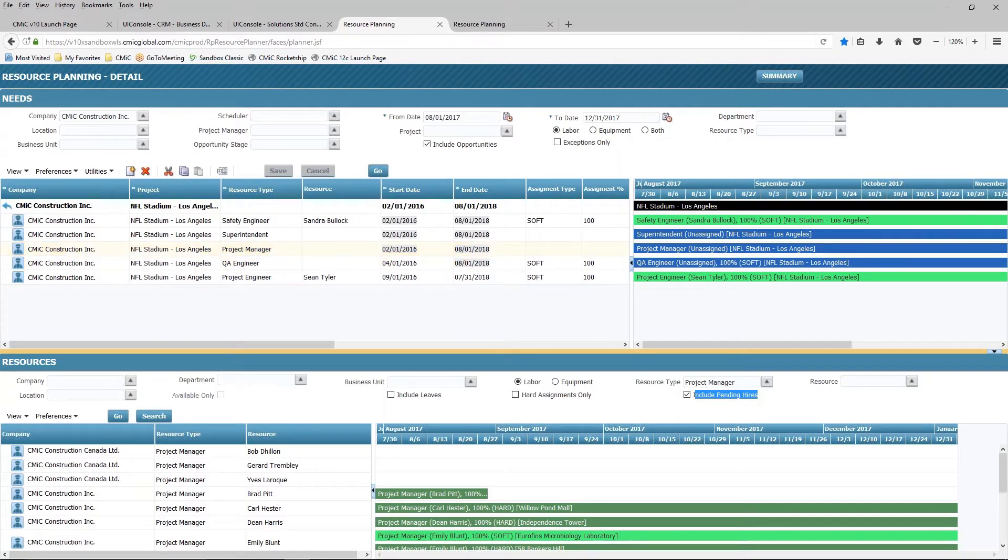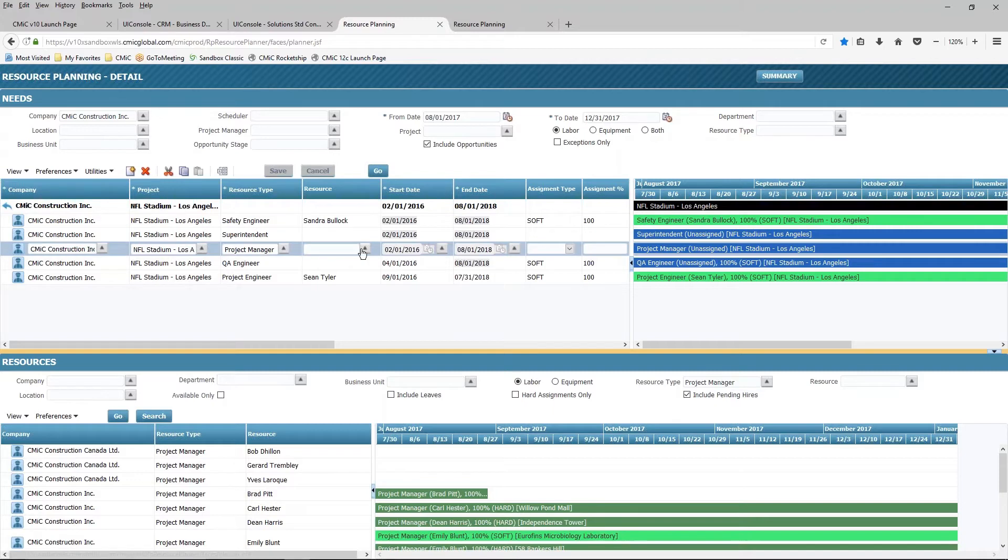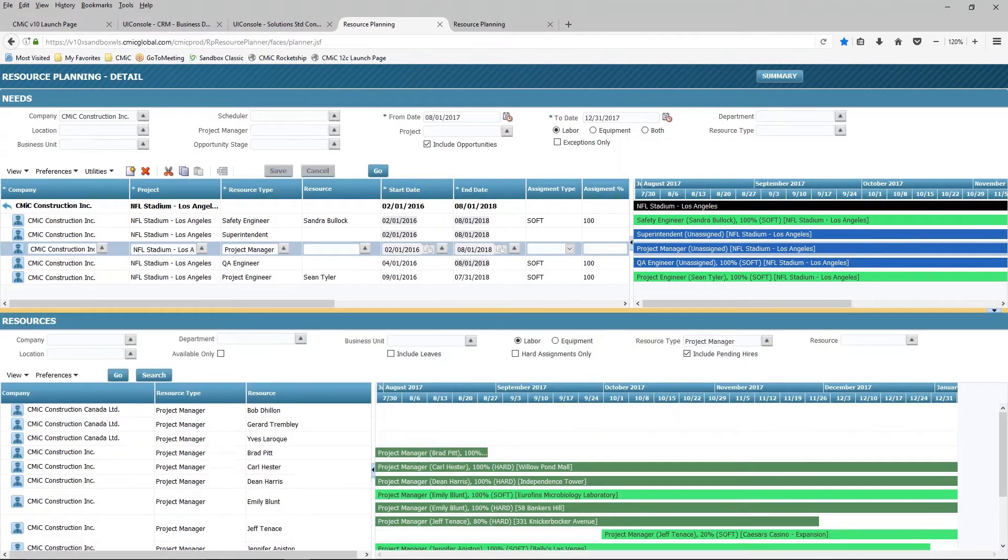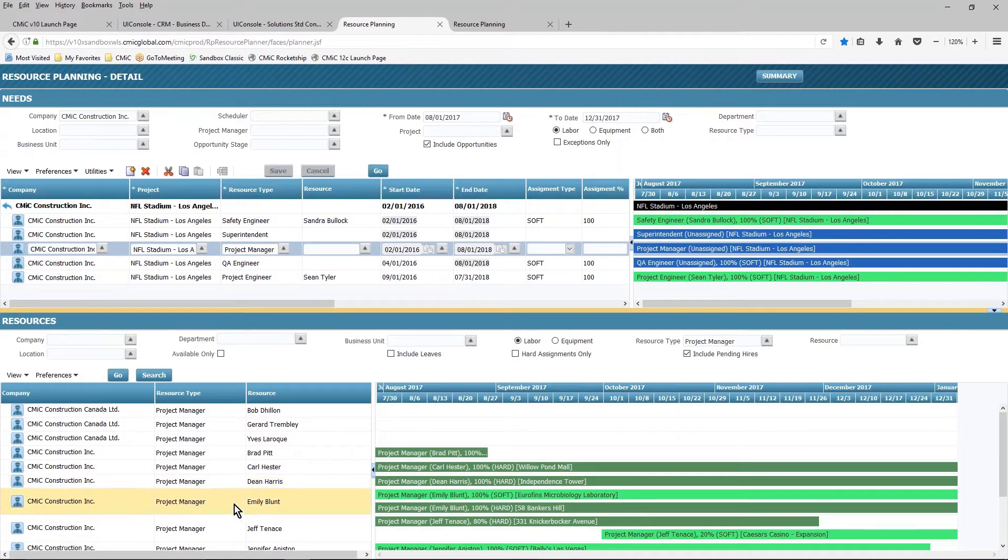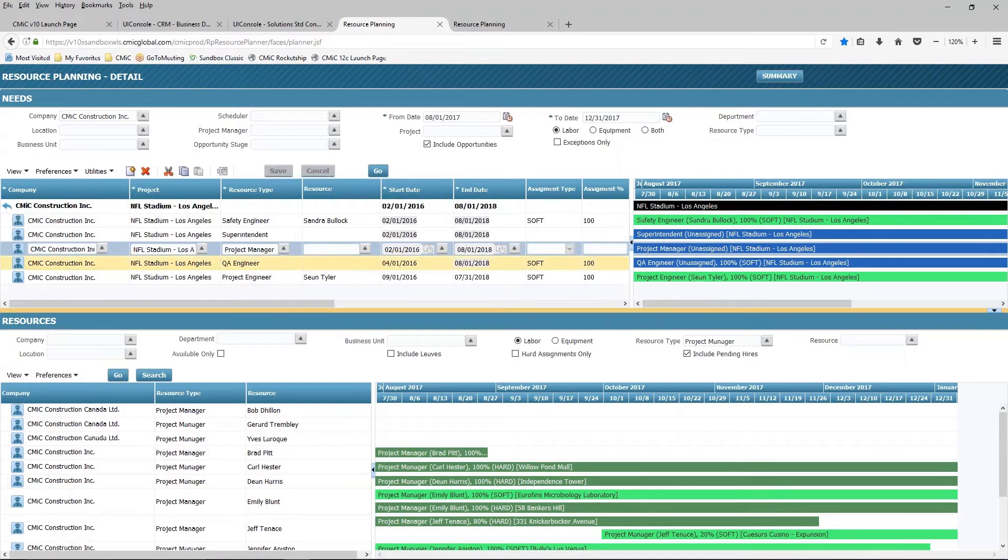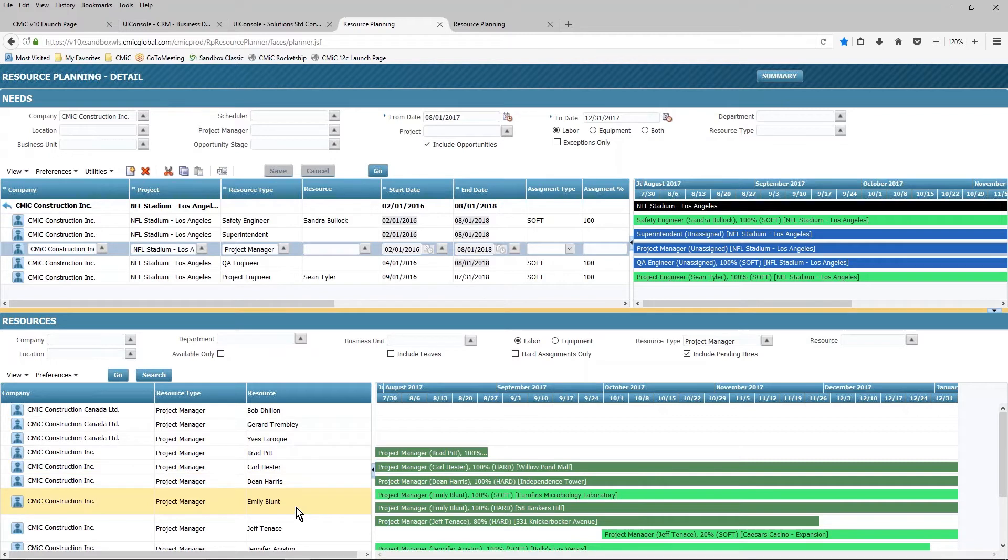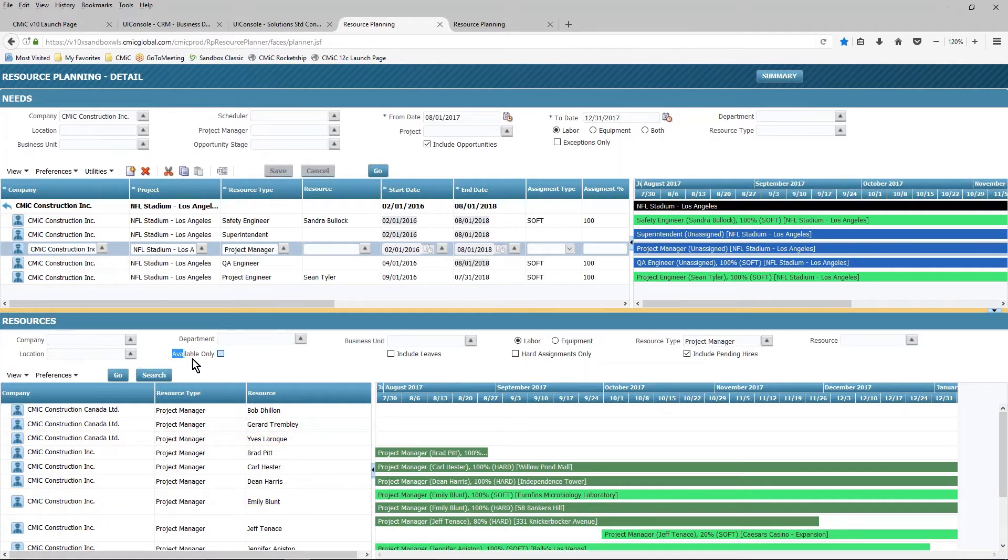When I click on this line, it opens up the fields here, and then down below, I see all of the resources that I have available in terms of project managers to fill this particular need. Now it's possible that all of my project managers are 100% allocated to existing projects, and I can fine-tune that again by turning on the available only flag.